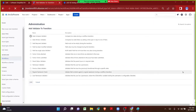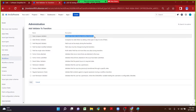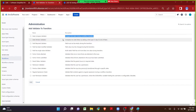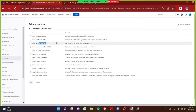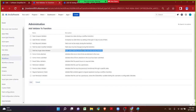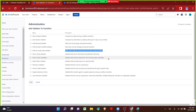If we want to add multiple validators on a particular transition, the path is the same — just click Add Validator. There are multiple validators available. For example, if you want to compare two dates during a workflow transition, you can use a date comparison validator. One of the easy-to-understand examples besides Field Required Validator is the Field Has Single Value validator — multi-select field has no more than one value during the transition. When we are good with the basics we can explore the remaining validators.